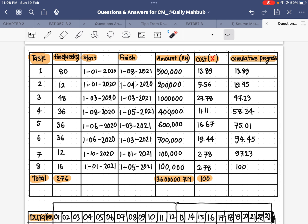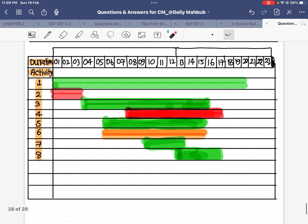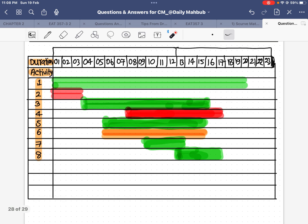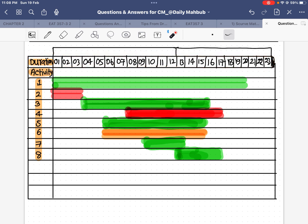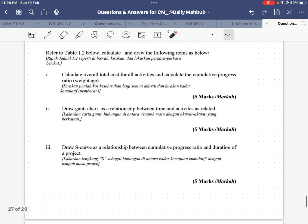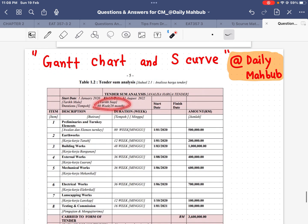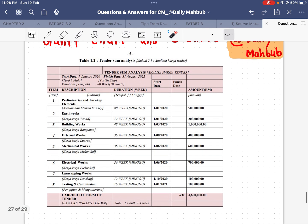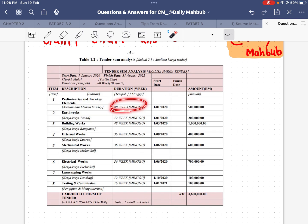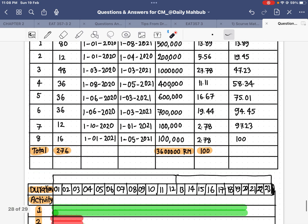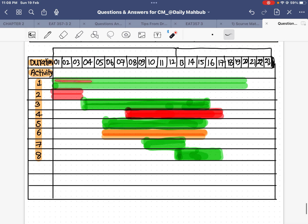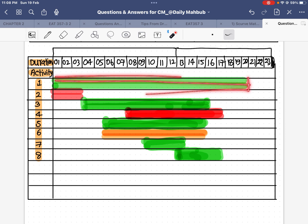Once the table is ready, we move to draw the Gantt chart. For the Gantt chart we have the duration on one axis and the activity on the other. The total project takes 80 weeks, which is 20 months, so the first activity spans 20 months — I put it from month 1 to month 20.